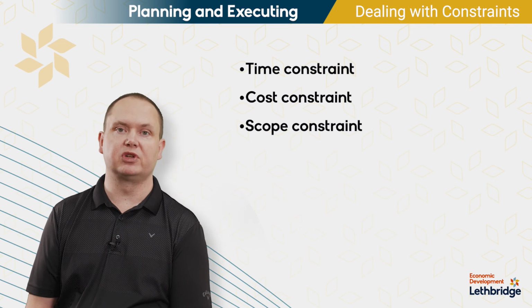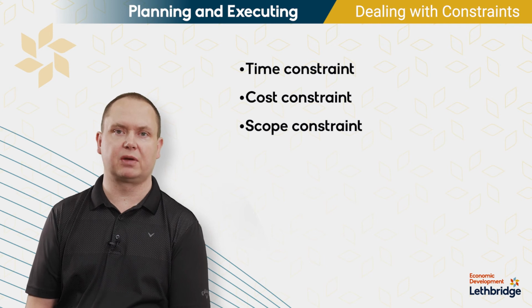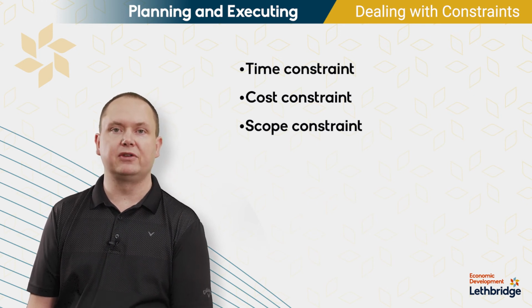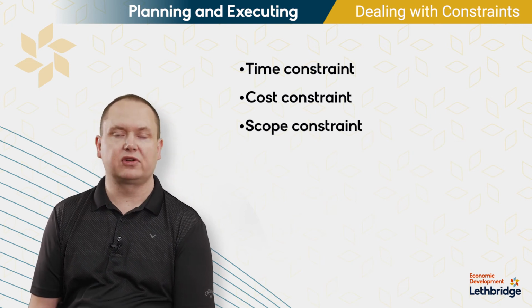I guess precedent would be just what happens before that work package. You'd normally identify work packages with some sort of number scheme, and then you'd have a column for precedence as well. And in the template documents, you'll see where that would be. But you look at those precedents and you figure out what's your critical path.